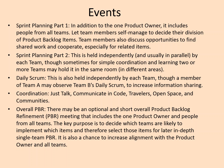Then we have the daily scrum, which is also held independently by each team. A member of Team A may observe Team B's daily scrum to make sure that information is shared between all teams and everything is done the proper way. Coordination is done through talking, communicating, code, travelers, open space, and communities.